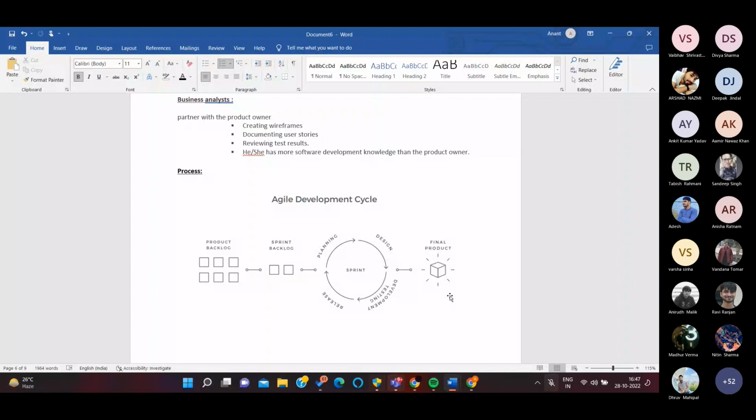And suppose your team size is very small and you don't have exact requirements. Nowadays, in startups, the requirements change very frequently, right? In that case it's better to prefer Kanban mode. In sprints we have metrics which tell how well the development team and the overall team are performing, so that the higher authorities can have a look. One metric is the burn down chart.